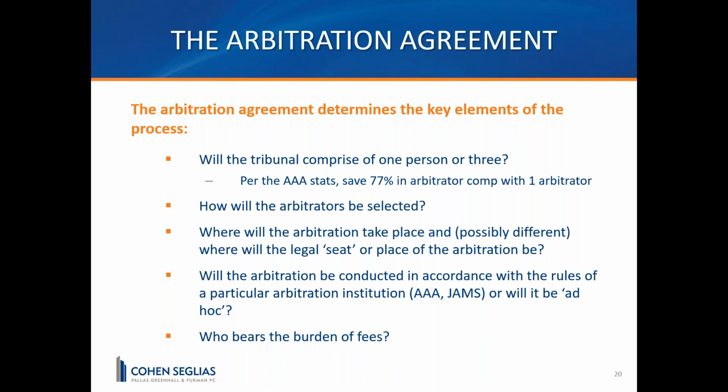Where the arbitration takes place is generally where the project is located. Now I've been seeing a number of different provisions where the contract itself says it's going to be where the owner's principal place of business is located, but understand that many states have statutes requiring any arbitration or litigation to take place in the state in which the project is located.